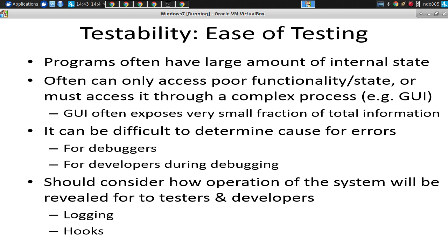Risks are uncertainties. They're uncertainties with consequences. And there's two ways we can mitigate them. One is lower the risk of it happening in the first place, the probability of it happening, I should say. And the second is, if it does happen, have it have less impact. In this case, we're lowering the probability that we will be hurt by a bug, and in fact, addressing if it does happen, if we have to fix a bug and iterate, the ability to spot any issues that may have been introduced by that fix.